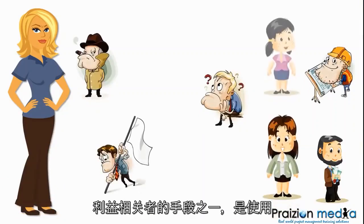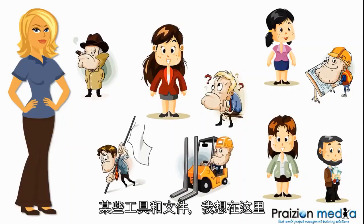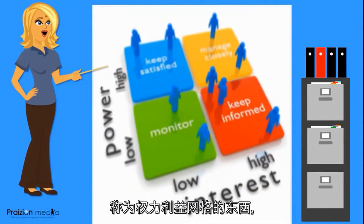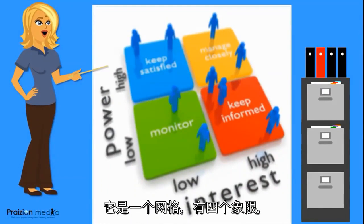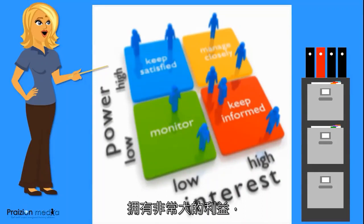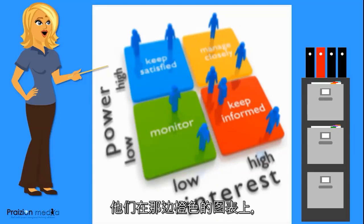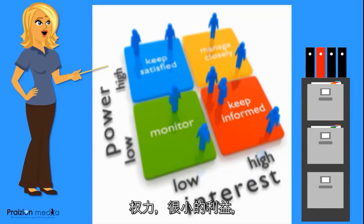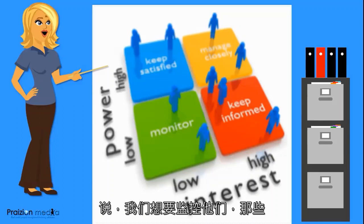Now one of the ways we get a handle on these stakeholders is by using certain tools and documents. One of the ones I want to point out here is something called a power interest grid. It's a grid and it's got four quadrants. We have those stakeholders who have a very high level of power and a very high level of interest — those we say we should manage closely, those are on the orange pod there. And those who have a high level of power but a low level of interest, we want to keep them satisfied. And those that have a low level of power and a low level of interest, they're on the green pod there, and we say we want to monitor them.